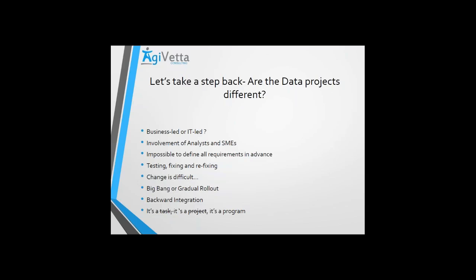Now, Saurabh had a question. Can you discuss the difference between business-led and IT-led? Typically in IT-led projects, business is more offhand. I'm a business sponsor and you just need to show the results. It is more so in the case of product management, where business would provide the money and have an occasional check whether you meet the parameters and have delivered as per the objectives, but they are not deeply involved. Whereas in a business-led project, business is involved right from the start, deeply, almost on an everyday basis, where they check the progress, focus on what needs to be delivered, check whether the team is going in the right direction, and mentor the team also. So that's the primary difference.